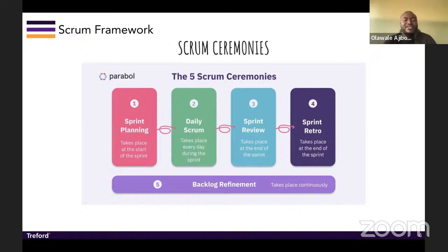And then the next one is sprint planning, which is where everybody comes together to pick what they will work on in that sprint. That's the primary purpose of the sprint planning meeting. Some people choose to do estimation in that session too, instead of doing estimation during refinement. It's totally up to the team and the way they would like to do it. But those things need to be done. You need to prioritize and you need to plan for the sprint. You can't just start a sprint without planning, right? So it's done at the beginning of the sprint, just like I implied earlier.